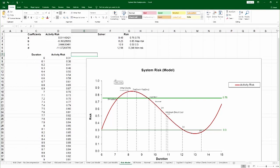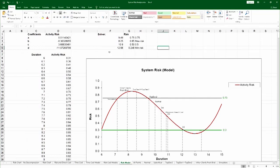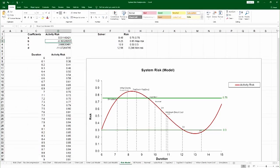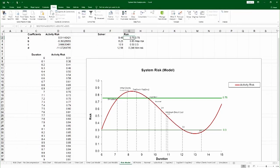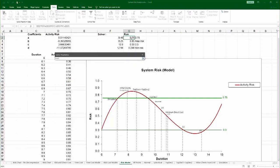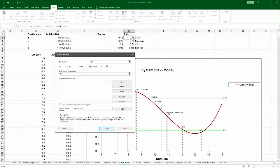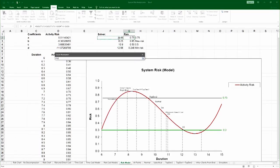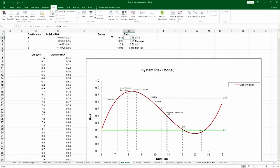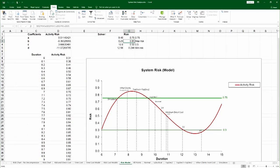There are two summary charts. This one shows the exclusion and inclusion zone assuming risk values of 0.3 and 0.75. You can see the plot of the risk based on the coefficients. These interesting points were done using Excel's Solver — once you have the equation, you can ask a reverse question such as: at what value of time will I get a risk of 0.75? In the Data tab there's a Solver, and you can ask it to find the value of time that gives risk of 0.75 — it finds 9.49. Similarly, you can ask what value of time gives the maximum risk, or risk of 0.5, or the minimum value of risk. It's just a visualization of those points as well as the various project design solutions.